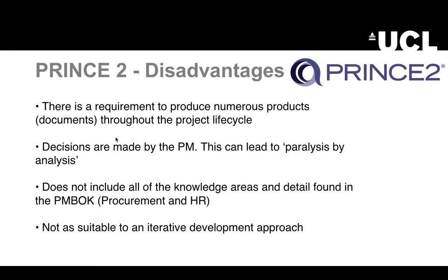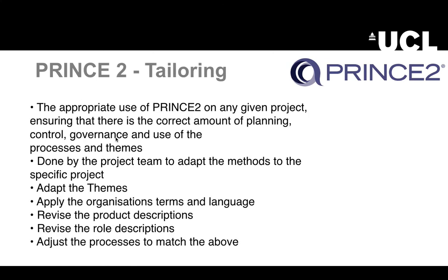Another important disadvantage is that this methodology doesn't include all the knowledge areas and detail that we can find, for example, in the PMBOK, particularly those connected with procurement and human resources, basically how to manage and lead our project team. And finally, this is not very suitable for an iterative development approach, which differentiates this methodology from the PMBOK methodology.